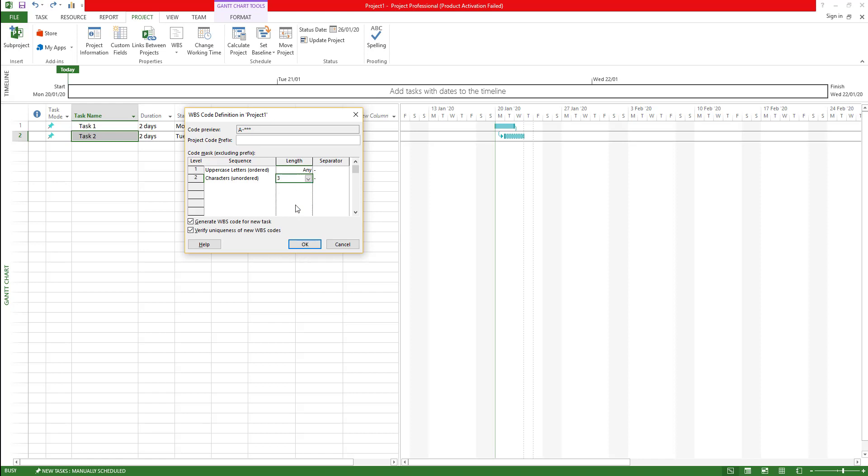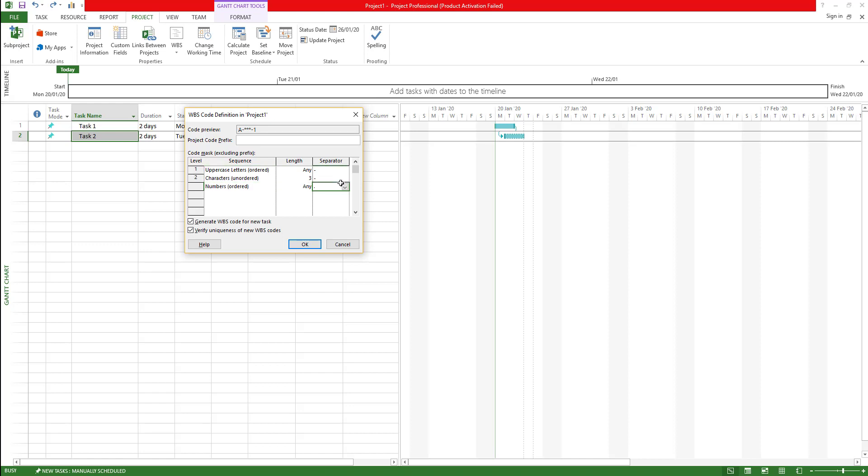Let's say I'm going to choose only three characters for these, and then the next one is going to be numbers. This will be any length and then the separator would be this one. Now as you can see on the header, this is how it's going to look like.